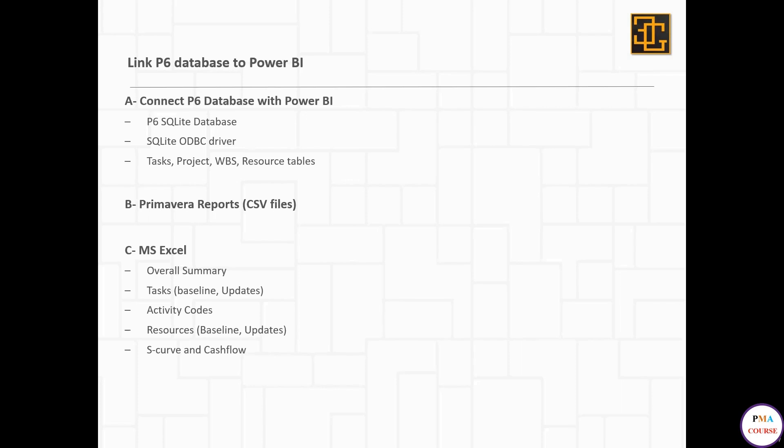So what exactly are we going to take from Primavera to prepare our database? First, we'll take an overall summary. Second, we'll use the task tables, either baseline or update.